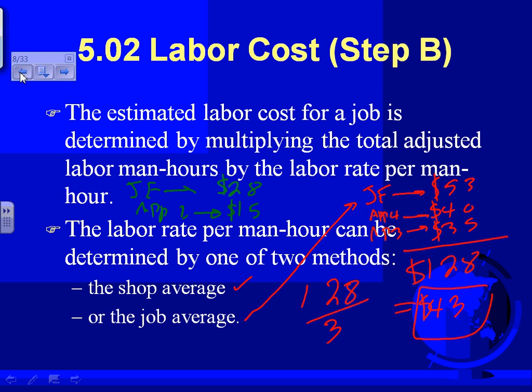This apprentice would probably be making apprentice 3 at least. He knows what he's doing. Otherwise, you pay him $8. Apprentice 3, and I have another apprentice 3, another $15. Can you guys add these together? 15, 15, 30, 58. Take the 58 and divide it by 3. 19.3. That's my bidding price. That's what I stick in, the 19.3, based on this crew.